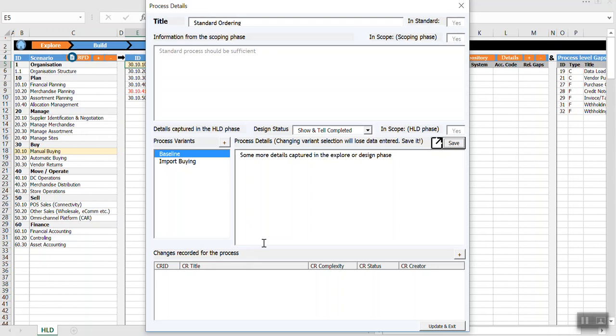Right. And one of the features of this particular tool is that the intent is to validate the scope against what was captured in the scoping phase. So in case the consultant realizes that the customer is now asking for additional things which are not part of the information the scoping phase has given, he could go ahead and add or record this as a change.